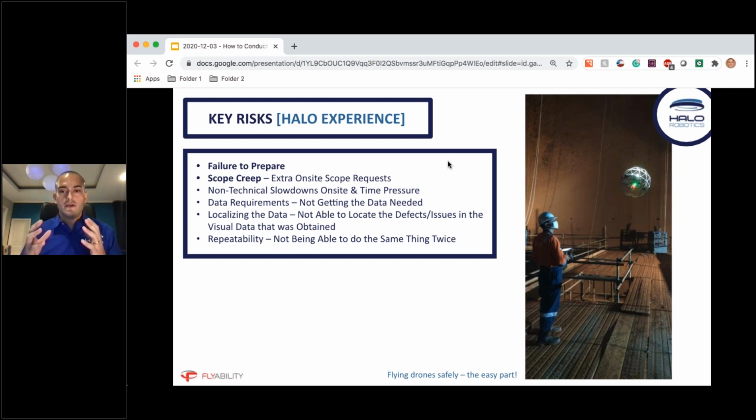I think scope creep is a huge, real operational risk. It's such a fundamental operational risk because that's where accidents will happen, in terms of management of time and management of fatigue, and not having prepared for the other thing that you are going to do.